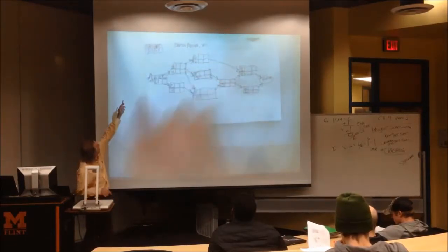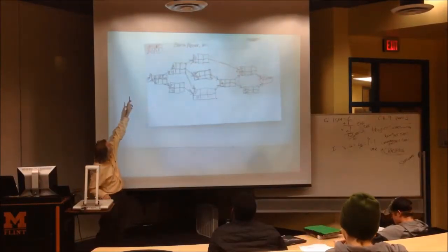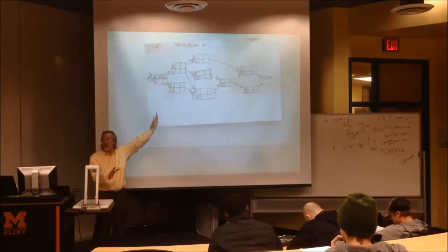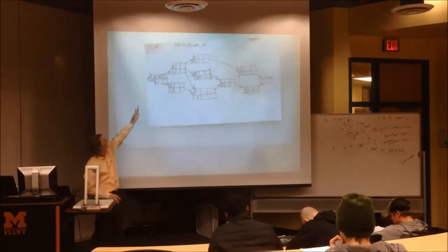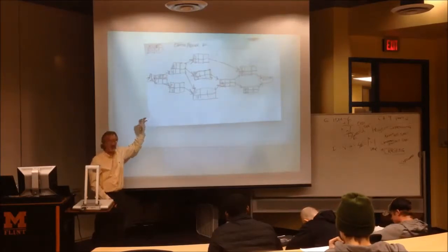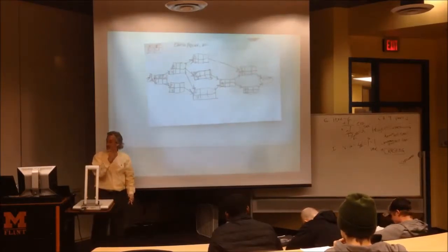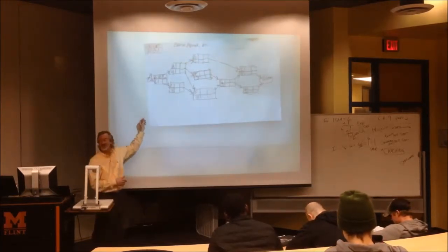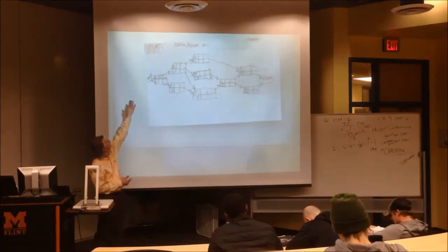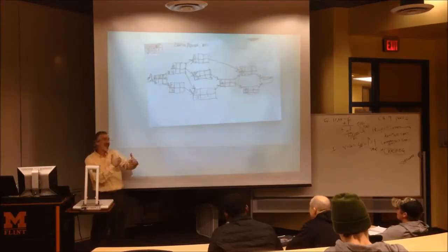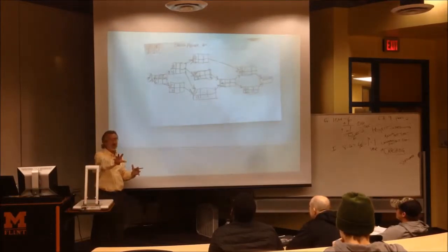Now I want to point out, up here, the top left-hand box where that 0 is, is called the earliest start. That activity could start as early as 0, right away at the beginning of the project. The top right-hand box is your earliest finish. The earliest A could ever get finished if this project gets started is in 6 units of time. The bottom left is the latest start. If it's different than the earliest start, that means this activity could start on day 0, but it could start as late as that latest start and not hold up the project.